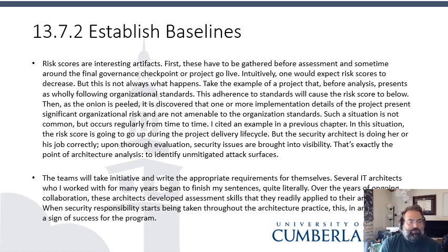In this situation, the risk score is going to go up during the project delivery lifecycle, but the security architect is doing her or his job correctly. Upon thorough evaluation, security issues are brought into visibility. That's exactly the point of architecture analysis, to identify unmitigated attack surfaces. The teams will take initiative and write the appropriate requirements for themselves.